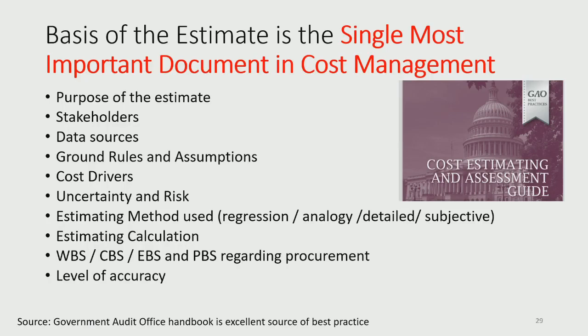So I'll share this with you later. But you tend to just write everything down like that. You write everything down, and that's your audit. So then KPMG, or Atkins, or whoever the consultancy is, comes in and looks at your basis of estimate. And this is when, I don't know, a year later, 2 years later, somebody knocks on your door. Hello? So the cost has overrun by 70%. Where's the basis of estimate? What happened? So you write everything down, just like you would do in any scientific experiment. You have a basis of things.